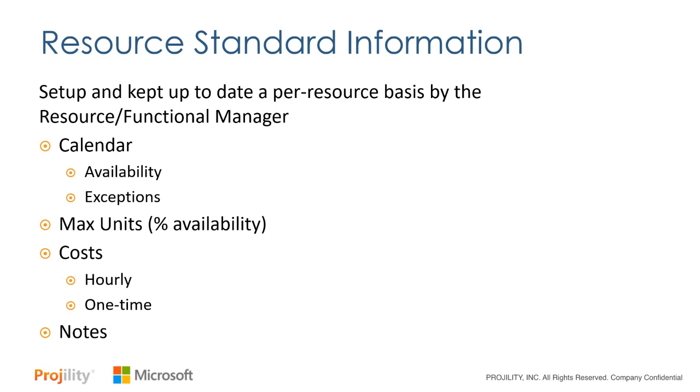Resources can also have costs, where you can put an hourly cost or a one-time cost in there. And then as you build your work plans, you can do a bottoms-up estimate. How much are the resources going to cost? If I swap people out, does that cost me more or less? By the way, where am I versus where I should have been from a resource cost perspective? It does not replace an ERP or a financial management system.